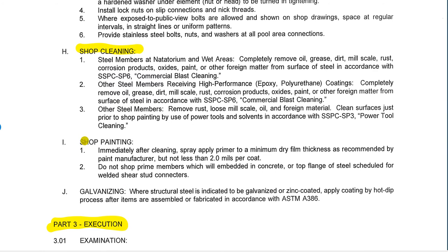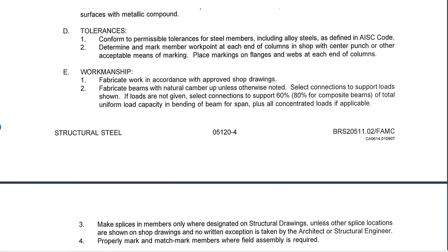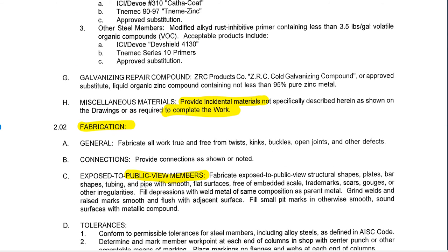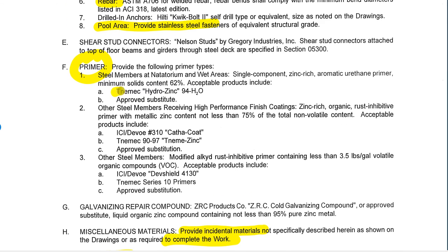Finally, there's shop painting. Above, we talked about the product to use for shop priming — here we talk about the actual priming and how thick to put it on. Going back up to the primer section, it tells us exactly what to use depending on the application. These are the different actual primers that can be used, and many of these have an approved substitute. There's a whole process in division one that covers how to get approval of a substitute element.